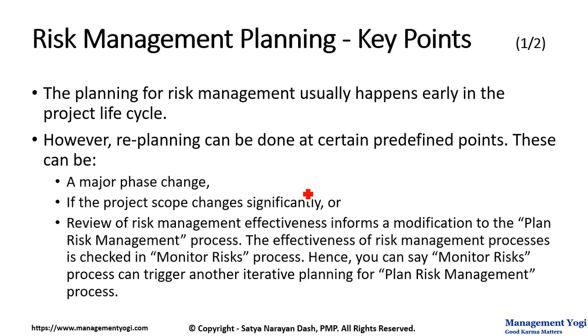However, replanning can be done at certain predefined points. So planning is not a one-time activity. You can have replanning as well. The predefined points can be a major phase change if it is a multi-phase project. If the scope of the project changes significantly, at that time you can also go for replanning with respect to risk